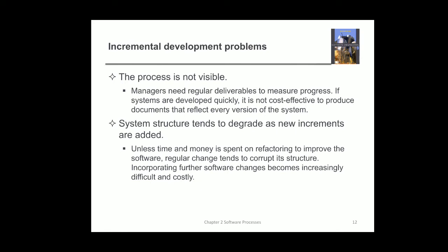Because if you follow a waterfall model, we know that once you are done with the requirement phase, the next phase is the design phase, right? Once design is done, you go for implementation. Once implementation is done, you go for operations and so on, right? So we can say that we are in such and such stage. But if you consider an incremental model, there is no specific stage. So managers find it a little difficult to handle the progress.